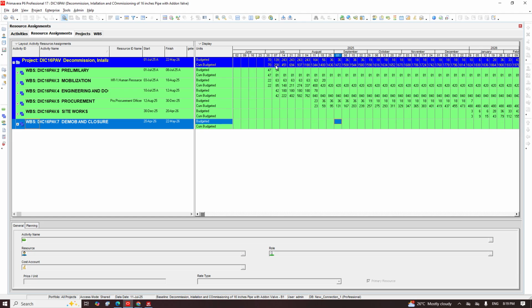If you add them together, it gives you the cumulative. July 7th, you bring down the cumulative, which is only 70 on June 30th. Then July 7th, you are seeing only 137 plus 70, it will give you 208. Then by July 14th, we have 243. We add it up to 208 here. It will give us